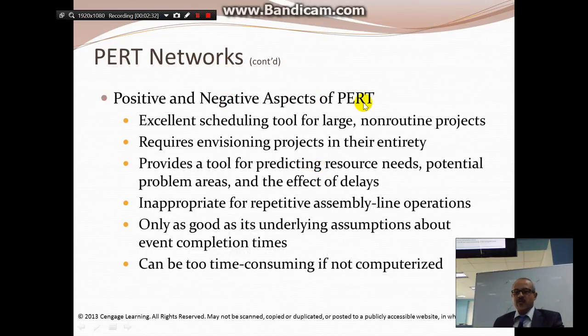Positive and negative aspects of PERT: it's an excellent scheduling tool for large non-routine projects. It requires envisioning projects in their entirety, provides a tool for predicting resource needs, potential problems and effects of delays, and is inappropriate for repetitive assembly line operations. It's only as good as its underlying assumptions about event completion times and can be too time-consuming if not computerized.